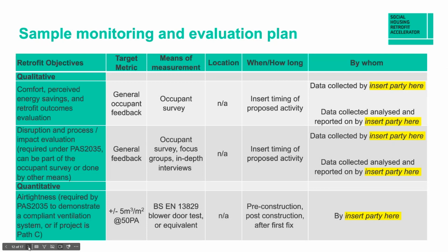And again, you need to understand the starting position to know whether that's a good outcome or not, because if we go back to taking comfort, it may be that somebody lived in a house that wasn't very warm. They didn't really use their heating because they just felt like they were burning through money and it wasn't making a difference to the house that they were living in. You go and do some refurbishment, retrofit works, you've made that house more energy efficient, they can now afford to put their heating on. So actually their bills have gone up because they weren't really using it previously. So we need to consider that within the whole round, and not just think, oh my God, the heating bills have gone up. Why is that? And I think it's really worth having questions within a survey that say, have you changed how you heat your house? Have your heating patterns changed? So, they are useful questions to ask if you want this level of detail.